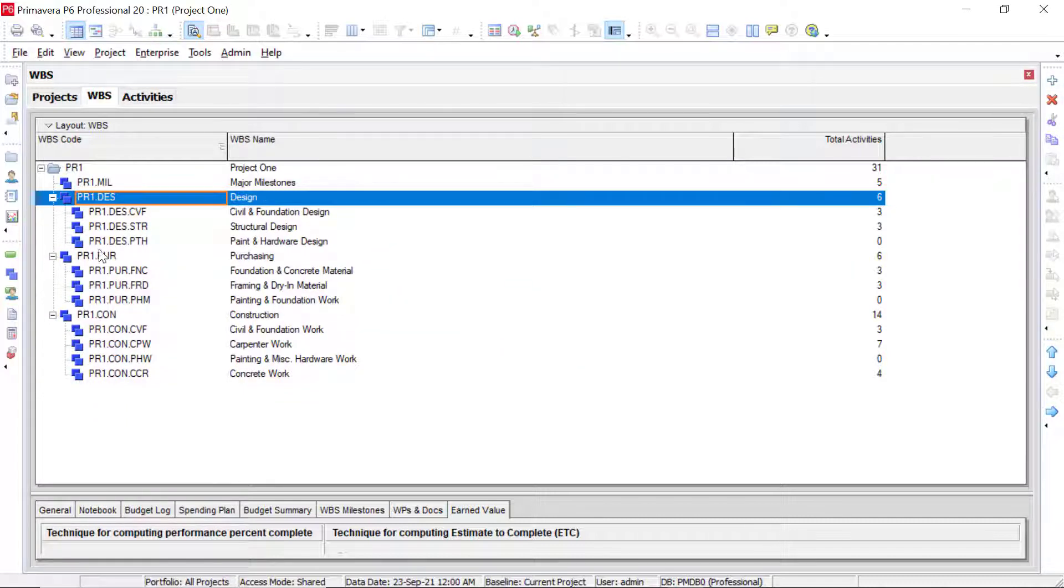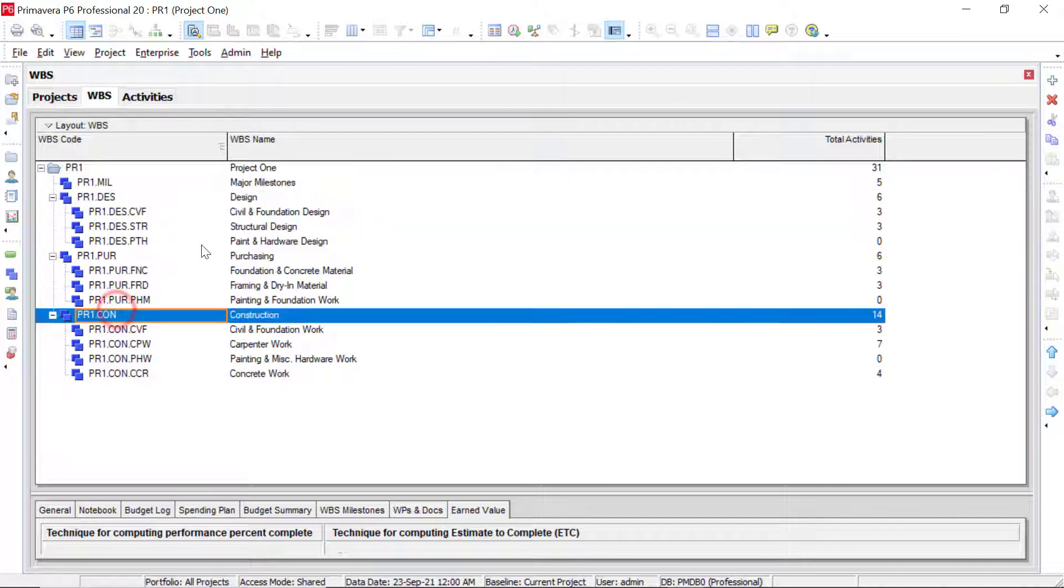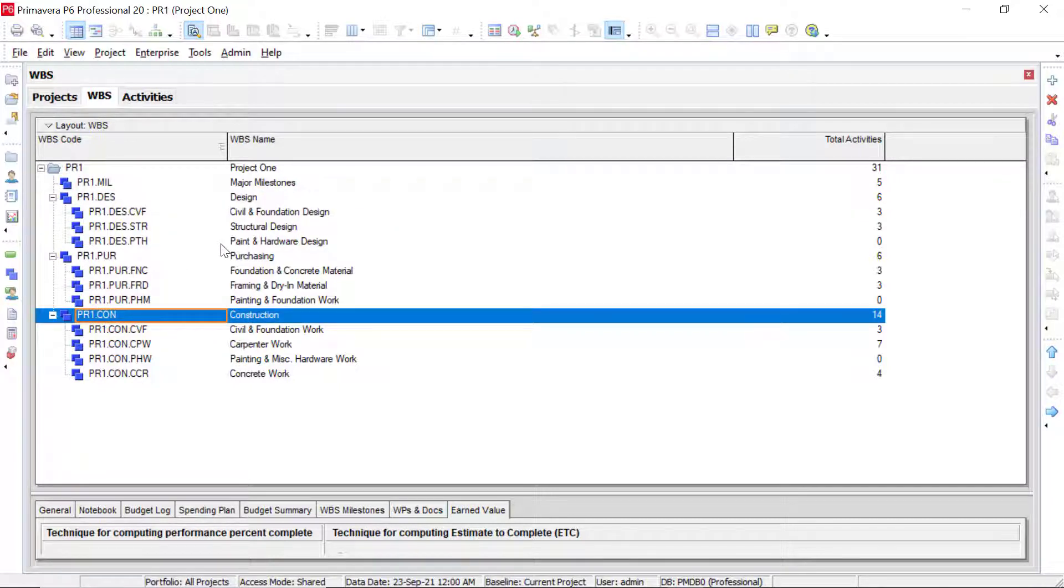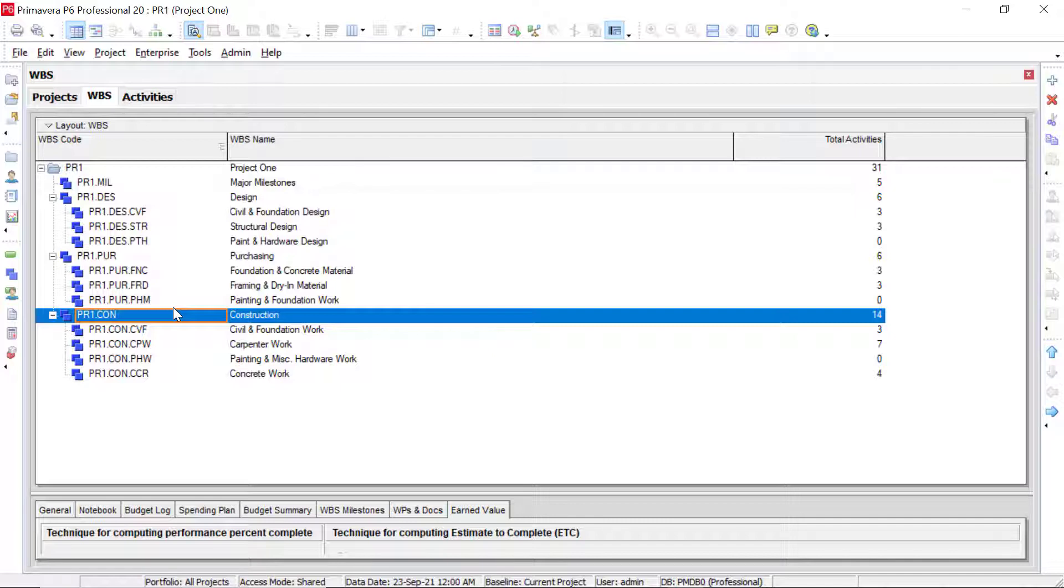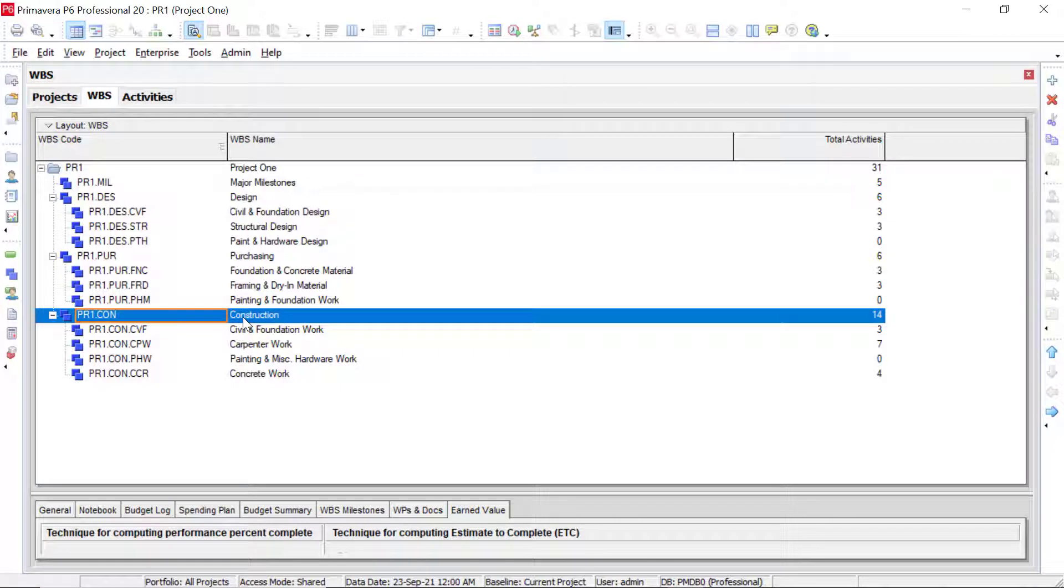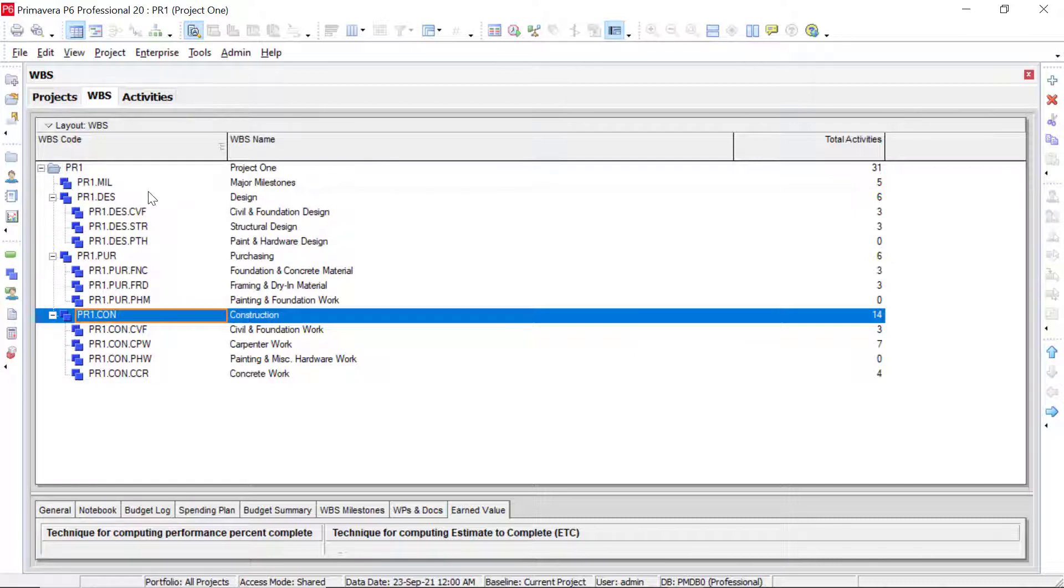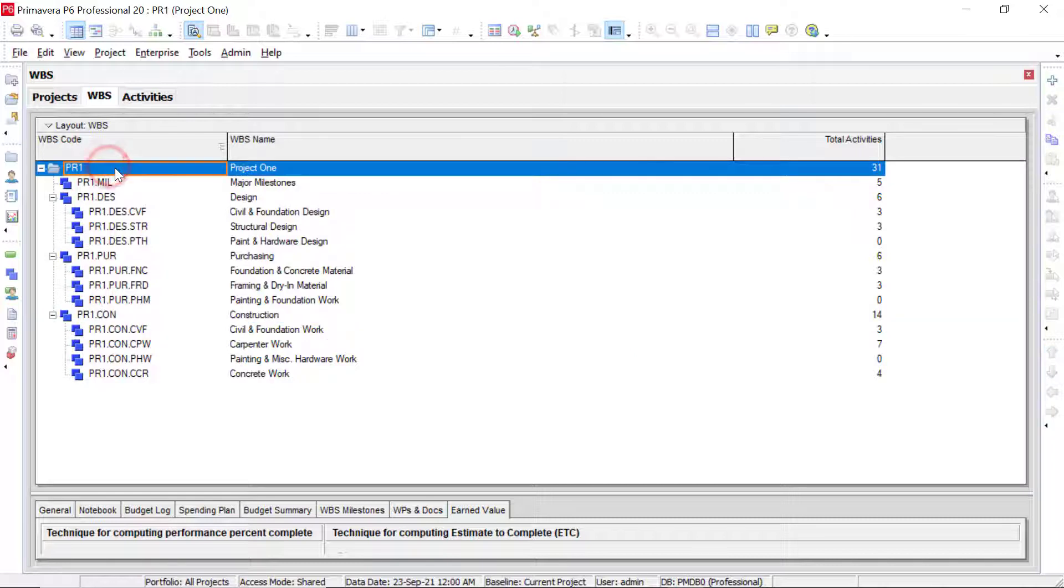So let's delete this one. So let's say right now we have our major milestones, we have design, we have purchasing, and we have construction. But I'd like to add one in for engineering. So to add one in again, multiple ways that we can add it in. But we want this one to be a second level WBS element. So if I were to select this construction right here and add it in, it would automatically add it in as a third level WBS element underneath construction. So what we can do is we can click on our project up here.